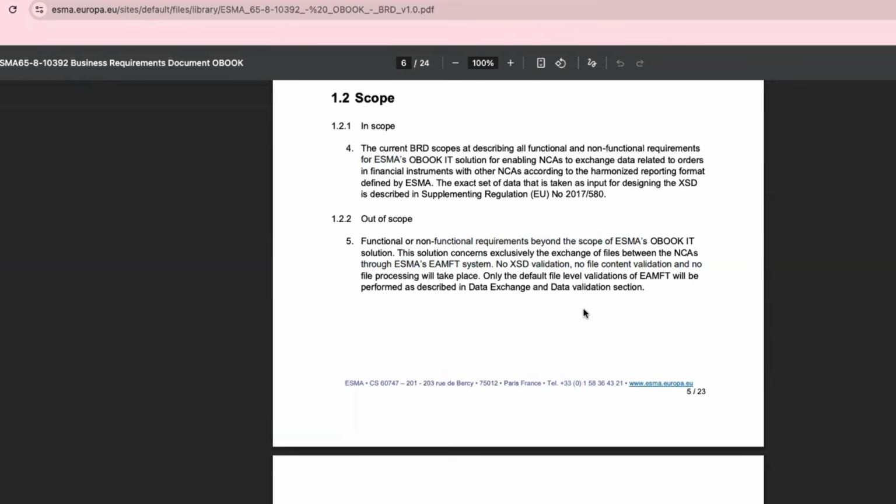Now they want to change the requirement, right? So you attach the BRD and just say that, as discussed in the call, business wants additional requirements to be added to the existing development project. And then you also ask business owners to acknowledge that email and list down whatever requirements are being missed. So this proof is very important. I have had experience in the past where business owners come and ask for something, and you don't have any proof of them requesting it earlier, and then they may escalate.